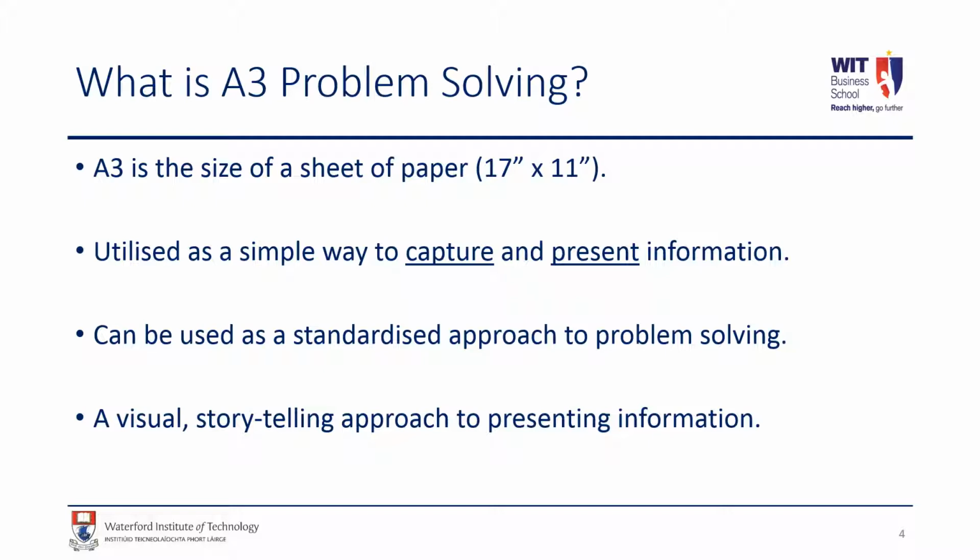So very usefully, the A3 report succinctly communicates the background to the problem, the current state of the problem, any goals that you wish to achieve, some analysis surrounding the problem or improvement opportunity, some countermeasures that you might be looking to introduce in order to deal with the problem or improvement opportunity, some future state that you might be trying to achieve, an evaluation of those countermeasures, and then how we are actually going to implement those as well, the implementation process chosen, and also then the evaluation of the success of those countermeasures and any follow-up actions that need to be taken.